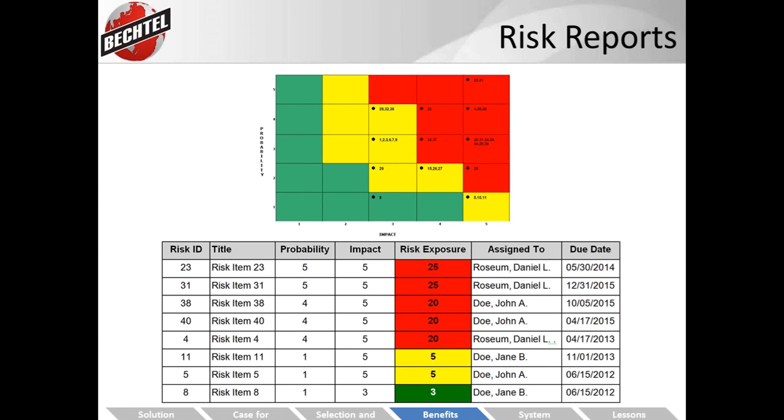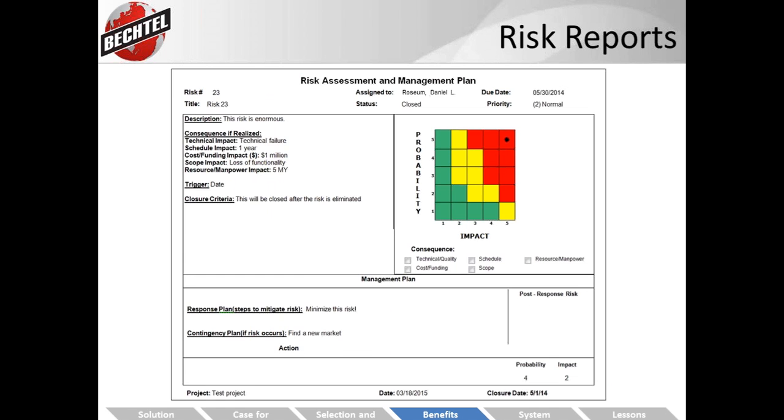But it's a very nice summary report that can give you a high-level status of everything that's going on in your project. So the risks, the issues, the contract delivery dates, what upcoming commitments. Commitments for us are basically just a promise to a customer that by a certain date we're going to complete something, so we keep track of those. There's a more detailed version of this as well, second page, where we get into what procedures are coming and going between us and our suppliers, what contract surveillance is occurring at that facility, and recent project documents.